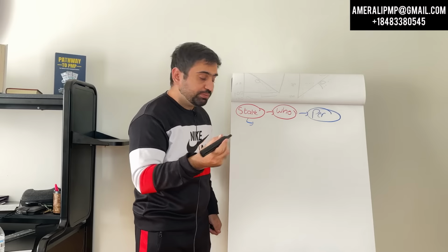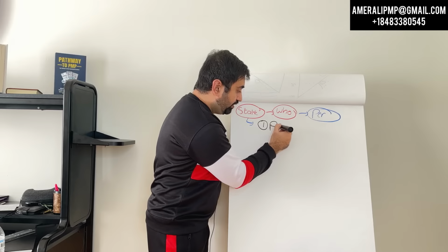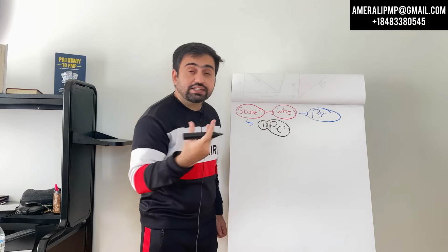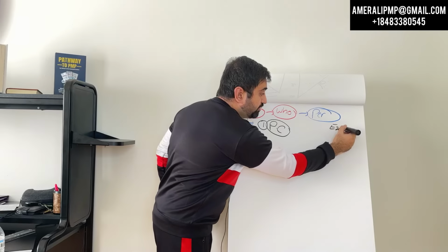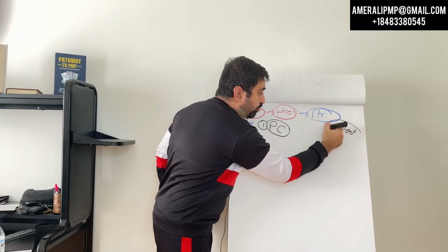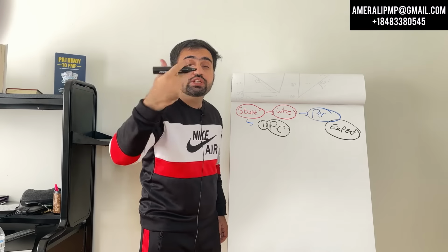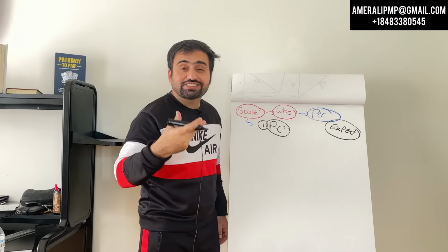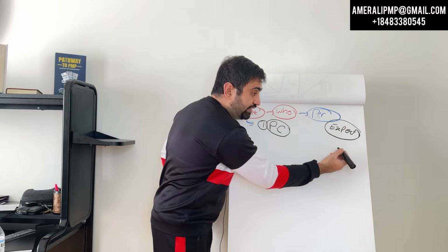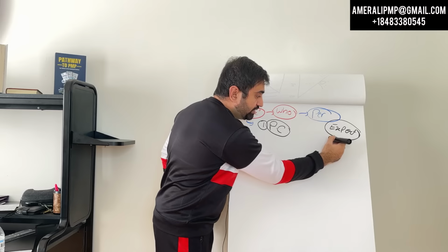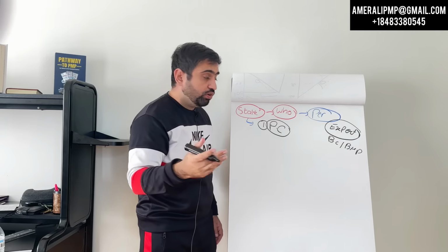The first and most important thing, since we have a project charter at hand, is that we will look at who the key stakeholders are, and of course expert judgment, asking the sponsor, will help us. We will ask the sponsor who the stakeholders are. He will give us the list of key stakeholders. We will review the project charter. Then we can also review the business case and the benefit management plan. We have key stakeholders now.